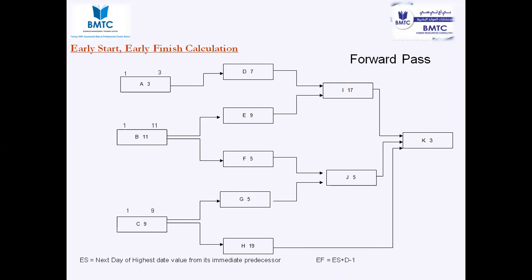9. Okay. If activity A is going to complete the early finish at the 3rd day, when do we need to start the activity D? 4th day morning, right? 4th day morning, right or not? Yes. 4th.